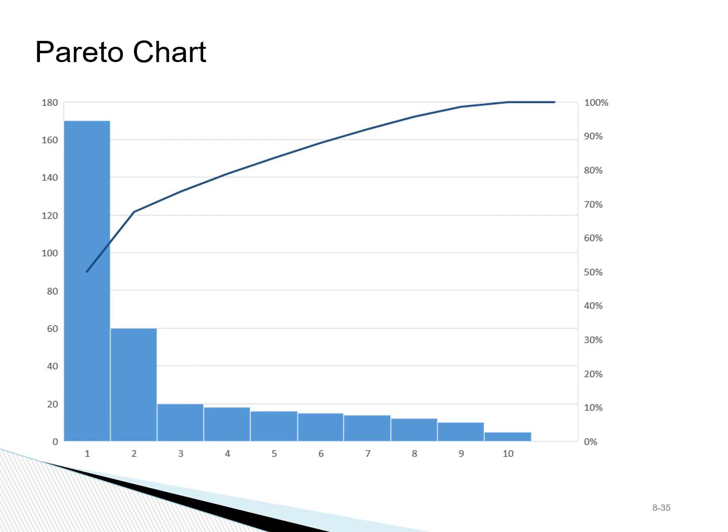So when we have identified all the items that need to be improved in the process, a Pareto chart is a good visual way to determine what needs to get addressed first. In this example, as you can see, the majority of problems are caused by issues 1 and 2. So we will get the biggest bang for the buck if we address these issues.